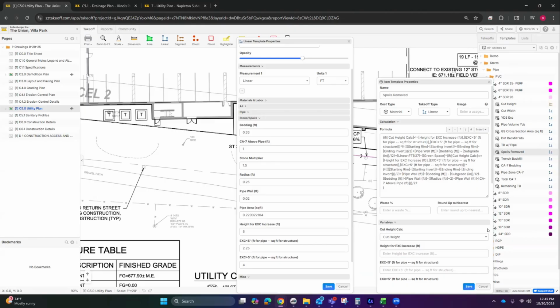And that's the one thing I do for sure that I changed. I know when I first started doing all this, I would really focus on finding all the 12-inch pipe and just go do all that. But now I literally break everything down from manhole to manhole. And it's really helped me greatly with figuring out change orders, figuring out what's changed with different plan sets and all that jazz.